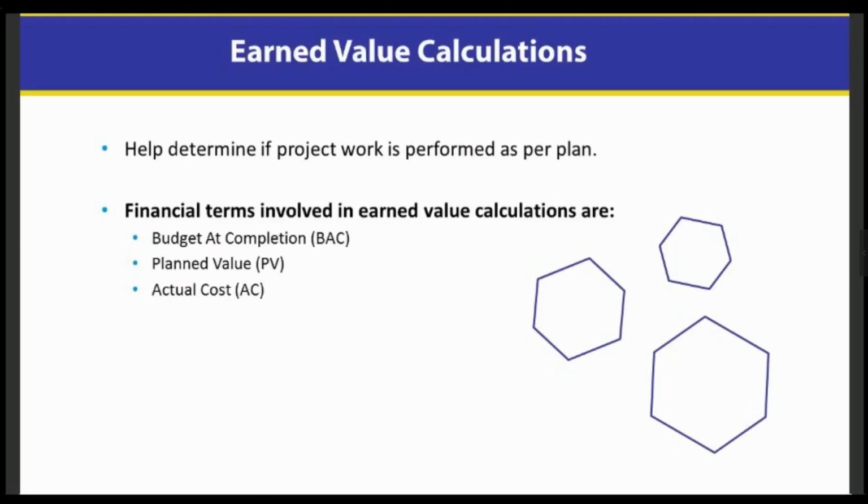Earned value is what's the value of the actual work that has been done. So when we look at how much work somebody has done over the course of a week or a month or what have you, what's the value of that? And is it where we had expected it to be? Okay. So those are the basis that we would use. So for schedule variance, we would start with EV, and then we would subtract PV, planned value. And if it's a negative number, then we're behind, and if it's a positive number, we're ahead. I don't really care how ahead we are, as long as we're as close to zero as possible, then I'm happy.